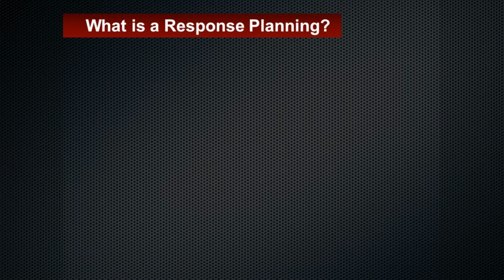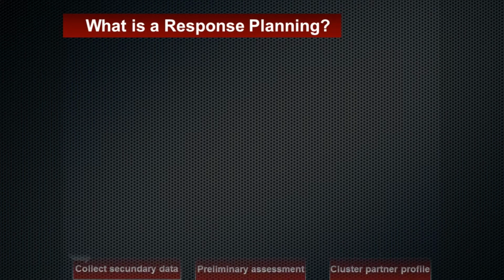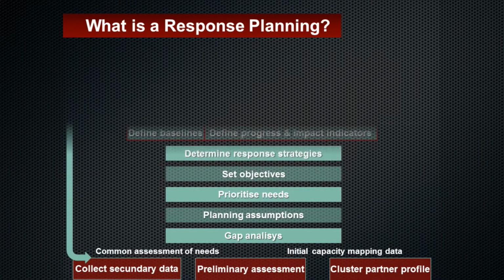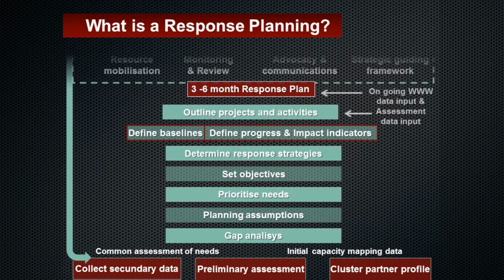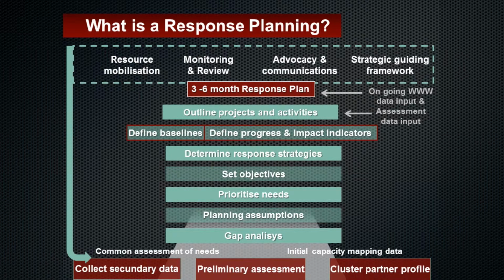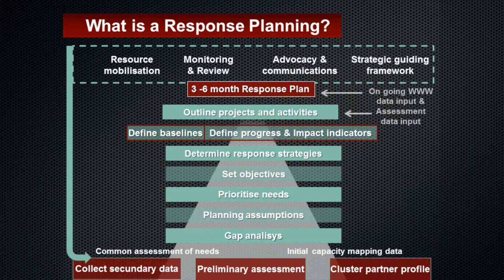The response planning is a process that includes the following steps. Have a careful look at the various steps that we shall need to take when establishing a response plan. Response planning is a process that takes us from the preliminary assessment to the gap analysis. After making some assumptions on the planning and based on the priority needs identified during the needs assessment, we shall be able to set clear objectives of the response, to define response strategies. Based on the agreed indicators of the response plan, we shall be able to outline the project activities.